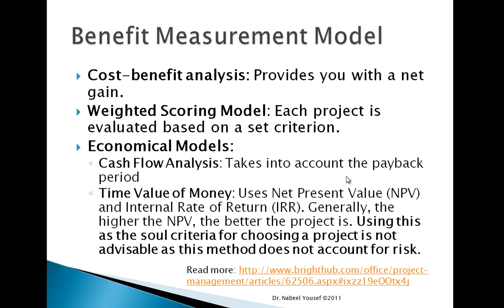Each project is evaluated based on a set of criteria. The economic model looks at the cash flow analysis, takes into account the payback period and time value of money, which uses net present value and internal rate of return, and generally the one with a higher net present value will be the better project to choose.